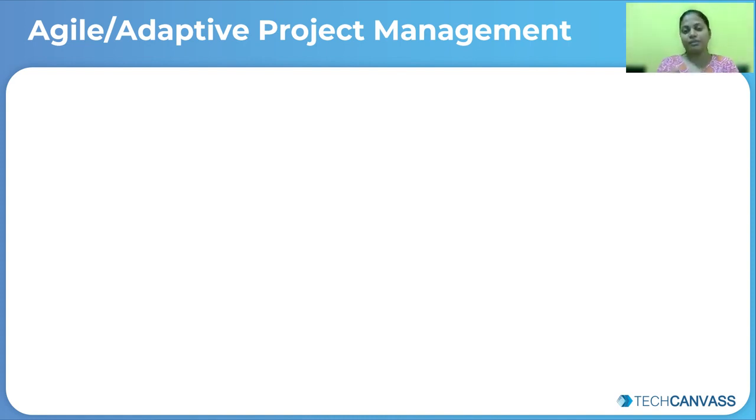So we came up with another concept, which is agile or adaptive project management. Say, for example, I know that to build this product from beginning to end is going to take me 6 months. Instead of releasing the product after 6 months, we divide the work into what we want to achieve in 1 month, and in that month we go by the week. Every 2 weeks, which we call an iteration or a sprint, we produce something.